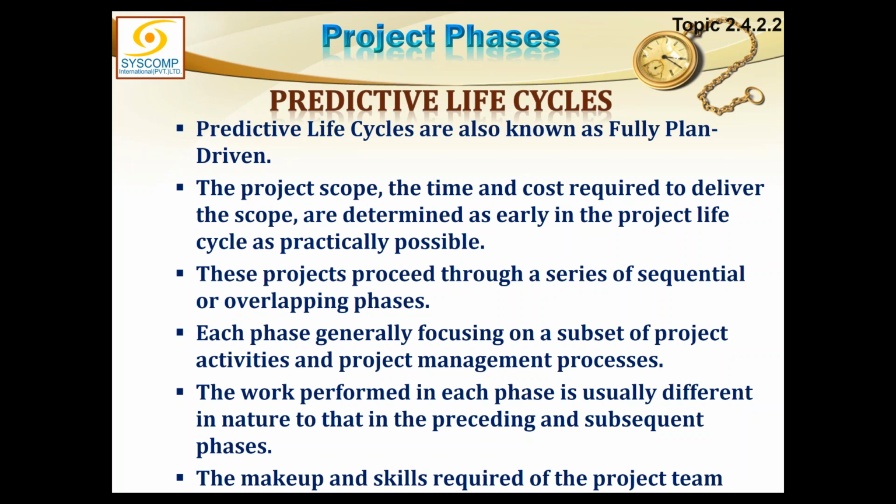You can say that all the data about the project is already available and is not likely to change much during the life of the project. Therefore, I can plan in detail right from the offset. When I start the project, I will do that detailed planning once, and then I will just follow the plan, and small little changes will be dealt with by the change request. Small little changes. But this is not the fate of all the projects.